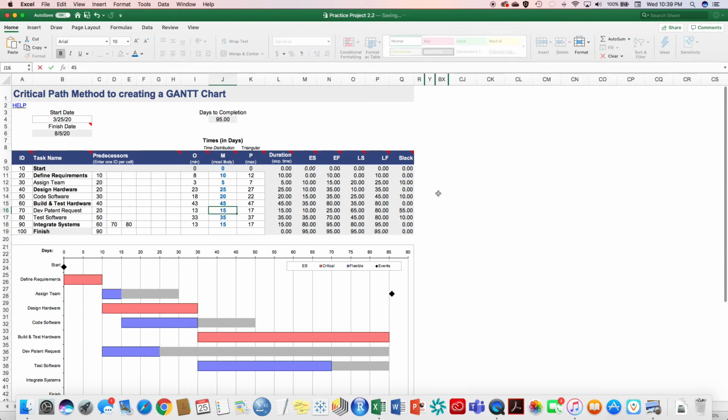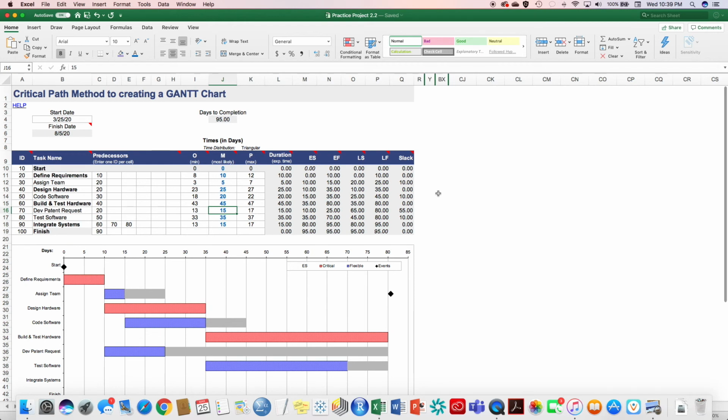And we're going to say 45 days here, but that then means that this is going to take us 40 days. And we can see that even though this one was shaved and we took the people from here and put them there, it did not have an effect on how long it would take us to test the software. And that's because we had extra slack built in at the end here. And so all we've done is take the slack that was at 10.